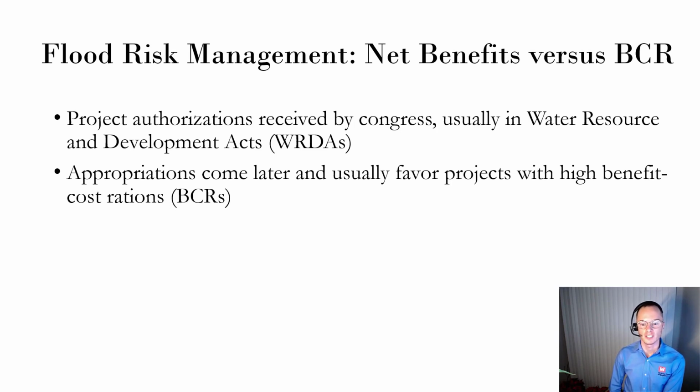Consider which has the highest net benefit and which has the highest BCR. The highest net benefit is alternative A with $50. The highest BCR is alternative B with a benefit to cost ratio of 10. Observe that the biggest gain is with alternative A, which has the highest net benefit. One can assume that any project with too high of a BCR is not properly optimized. Why would that be? If a program is returning $10 of benefit for every $1 increase in costs, then why would you stop at that point?